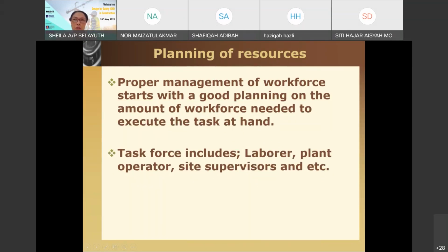Normally, okay, on the construction site, we have something called a daily report. Okay, so site report, basically daily report. And normally in the daily report, usually we will input the skilled workers especially. Okay, the engineers. So normally we'll input, okay, how many project managers, attendance on the site. Okay, how many engineers, skilled workers. Okay, how many plant operators, how many site supervisors. Normally laborers no. So normally we don't count the laborers.